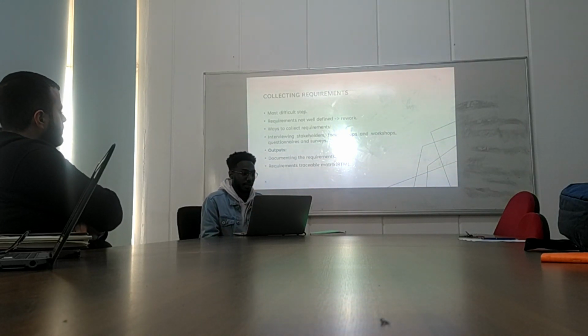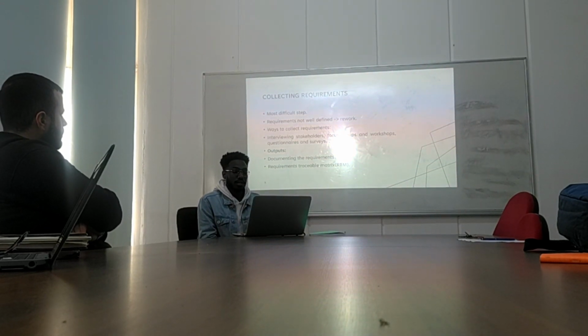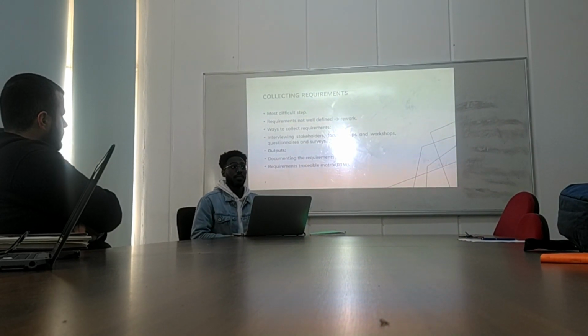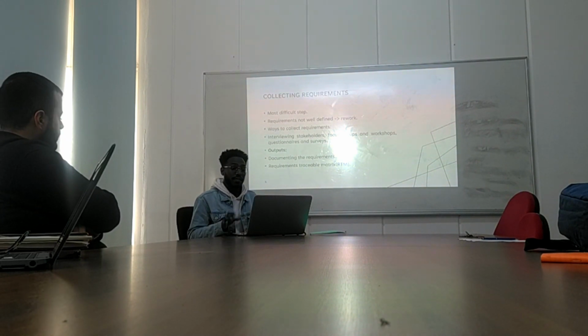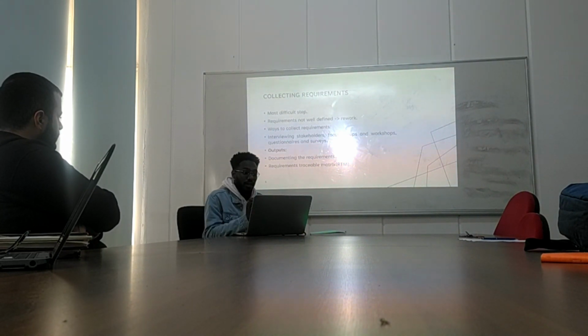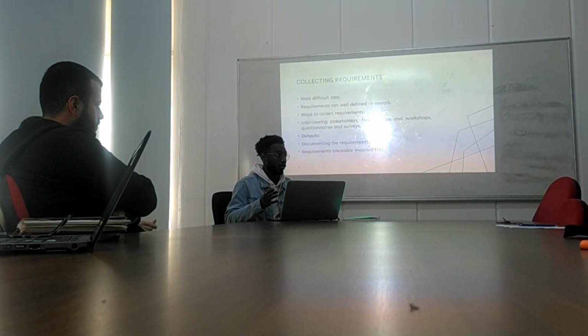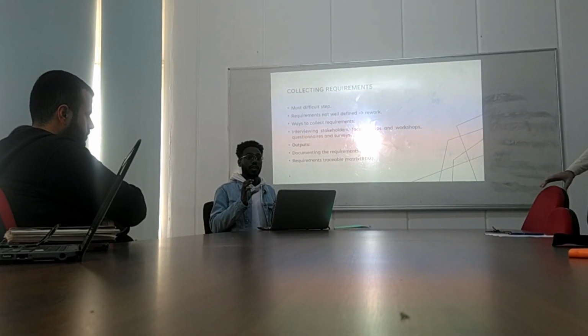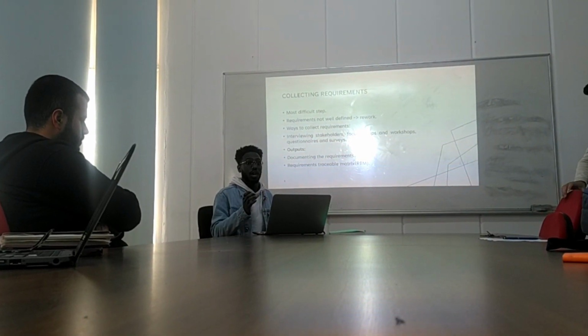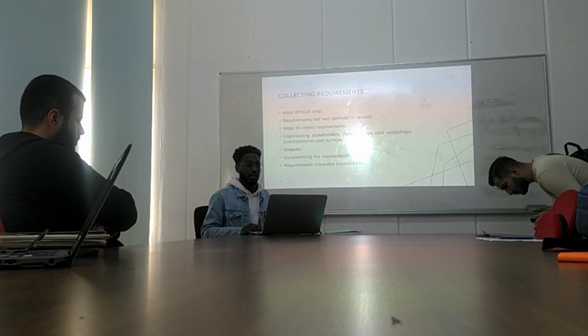And then the second step is collecting the requirements. This is the most difficult step because it depends on the project itself. If we have a big project, we need more requirements, and we're going to take more time in collecting these requirements. Also, whenever we don't define our requirements in a correct way, later on in the development of the project we are going to face a problem of reworking the project because our requirements were not well defined.